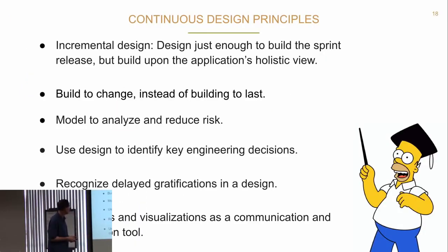Continuous design principles. So incremental design, just enough, again, to build the sprint, but build upon the application's holistic view. And that's what you end up with. As you keep going down your sprints and building up your design doc with it, pretty soon over time, not only do you have a built-up code base, you've also got the design built up with it, too.